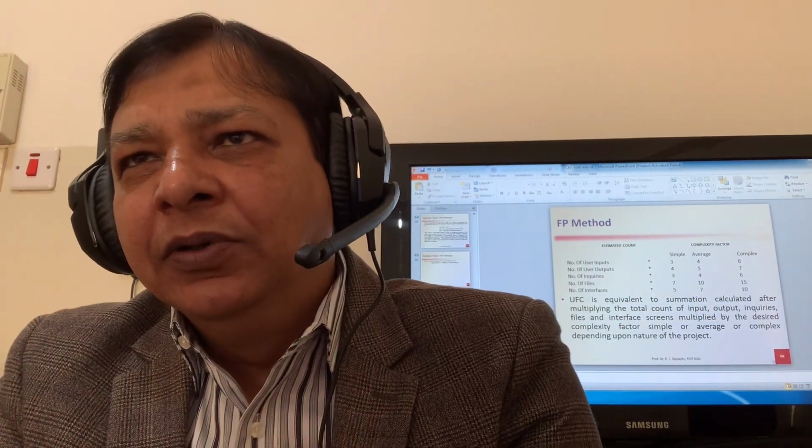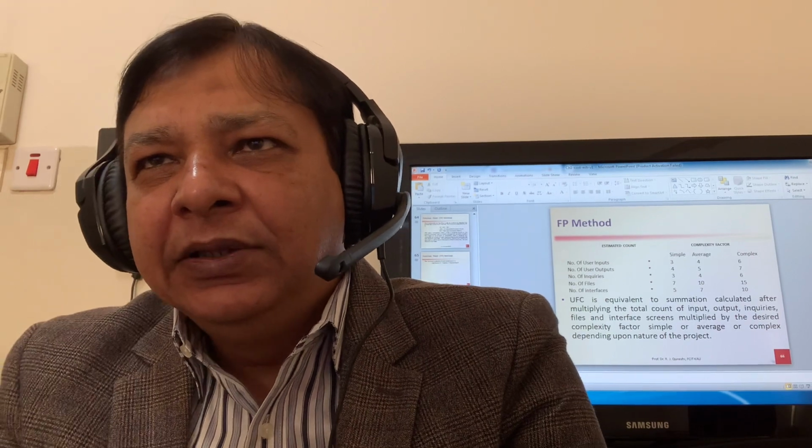So you multiply the EC value with the complexity factor, and then you have 5 values in the last column. The summation of these 5 values is equal to UFC. UFC is equal to the sigma summation of these 5 values that you have after multiplying the EC with the complexity factor.